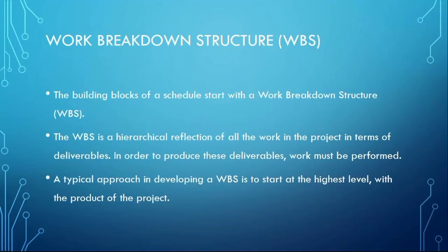So by the time you say, okay, clearing will take 1 hour. Leveling and pegging and marking will take under 30 minutes. Excavation will take under 1 hour. Mixing of the cement and the stones and the rest of them will take under 30 minutes. So you see, by the time you put it together, you won't be having 2 hours anymore. You'll be having like 5 hours or sometimes 10 hours.